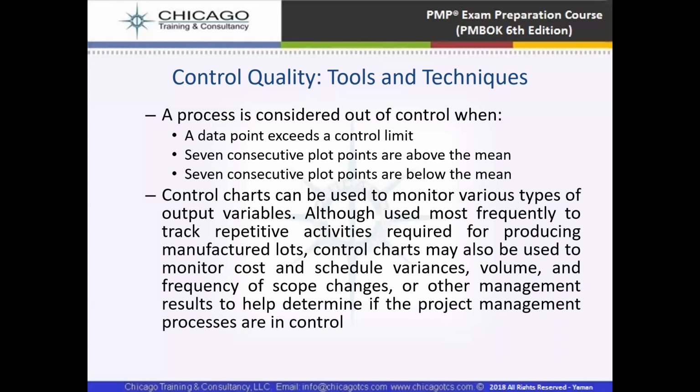So that's why project quality control is necessary, because it is going to affect our cost and our time, the time of the project. So that's why we should be complying with the quality, in time and within the cost. If we are not adhering or conforming to the quality, it means there is rework. And if there is rework, it means there are changes in the cost.